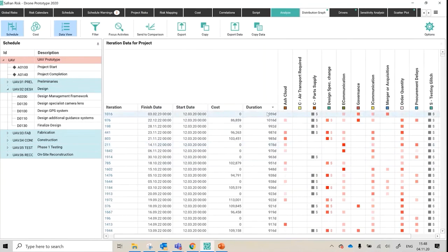So I'm now up at the double the deterministic. So the deterministic has virtually got doubled to about 1,000 or more days. I can see what conspired together to create that worst case scenario, or this P100 type scenario. I can see also, as I scroll down and I look, which risks fired on or tend to fire on during worst case scenarios. So this gives me some indication as to what might be typically at play in a bad day at the office.